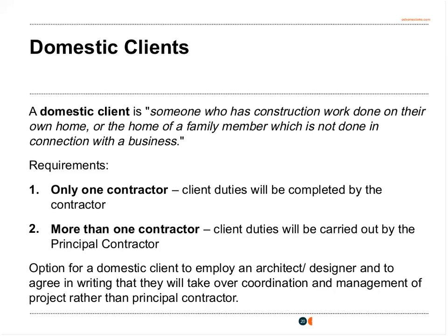But who this is particularly relevant to is the domestic builder. Now, if appointments under CDM 2015 are not made on a domestic client project, it is going to be the contractor or the principal contractor who picks up the responsibilities. So if you are a domestic builder, then construction phase plans are going to have to always be prepared by you. Somebody is no doubt going to need to decide who the principal contractor is if there's going to be more than one contractor, and it's most likely going to be your responsibility to talk to your client about that.